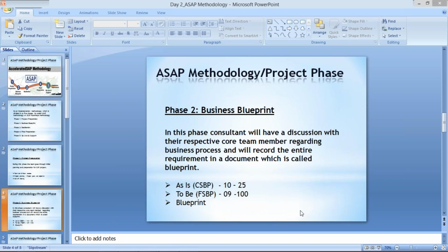One more thing I would like to add here, guys. Whenever you go for an interview, people will ask which version of the blueprint we send to the client for sign off, for signature purpose. So when you send your blueprint the first time, the client rejects it saying that these changes are required. Whatever blueprint we sent initially and that got rejected is called the draft version. Whichever blueprints are getting rejected, that is called the draft version.